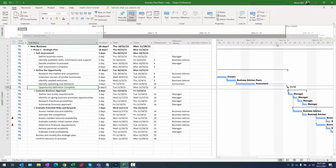Now we can see the task with a five-day duration in the Gantt chart. Let's zoom in — there's the diamond milestone. You can see approximately Tuesday through Monday, five days, and there's the milestone. That's a quick way to add a milestone that has some type of duration, like an approval process.